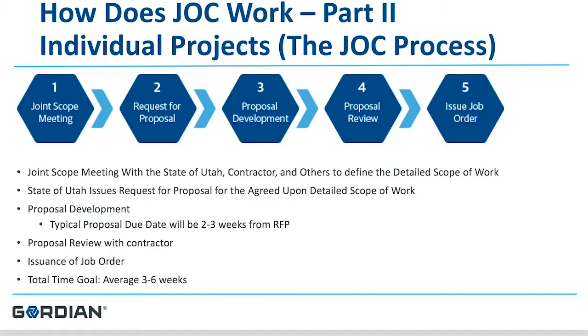The joint scope meeting is critical to the success for both the owner and the contractor. It's during the joint scope meeting that the owner lets the contractor know all of the different facets of the job. The contractor gets to learn all about the building they are about to renovate, including lifting up ceiling tile to find any unforeseen conditions, or pulling up carpet tile to see what's underneath the floor. The joint scope process helps lead to a far more accurate proposal in the end.